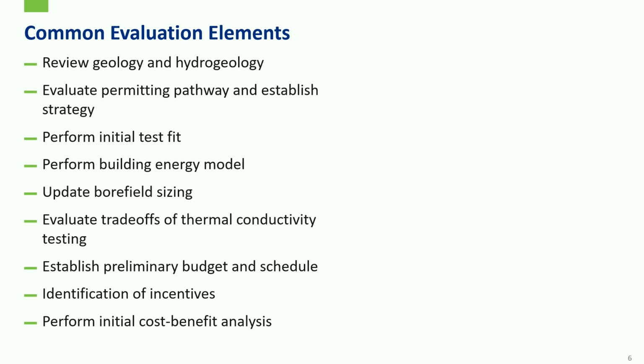So a few things that we're going to look at nearly every time we're doing a feasibility study. We want to look at the geology and the hydrogeology, what the drilling conditions are going to be. When we engage with a driller, we want to be able to do that in an educated manner. This is also an area where we might start the permitting discussion.